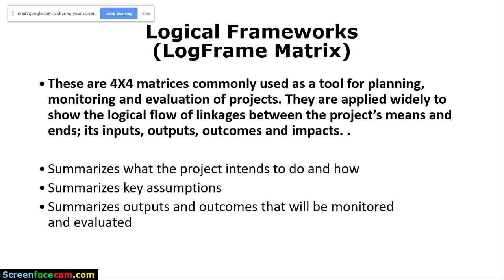Then an outcome is something that will come in the middle, because this one now talks about changing behavior. If you sensitize someone, that's an output, because it's something that you can say right after this meeting. I can say that I've taught them how to go about designing a logical framework. But an outcome now comes into asking, do they know how to do it? Are they doing it? That's an outcome. So it's not something that you can measure on a daily basis, or after an hour. It's a result that you see after a period of time. Depending on the problem, it might be 6 months, a year, 5 years, or 10 years. And that's what an outcome is.